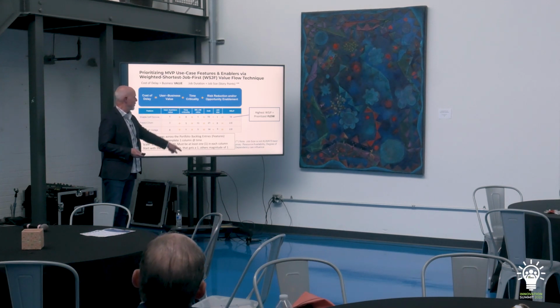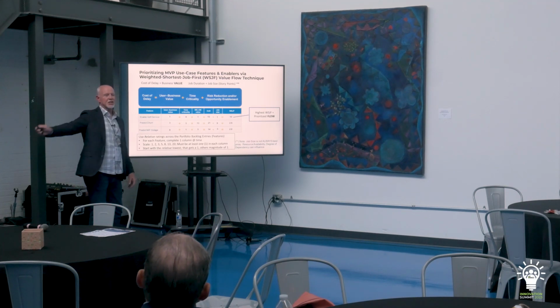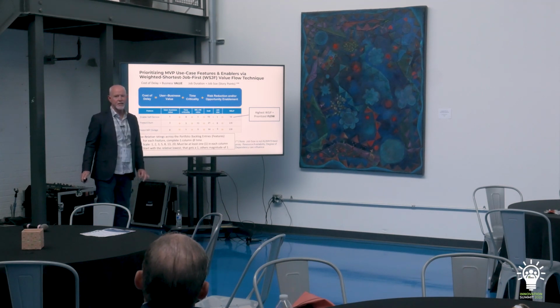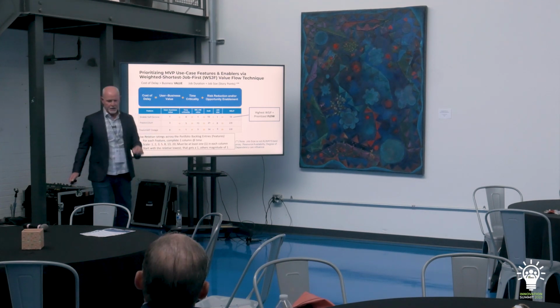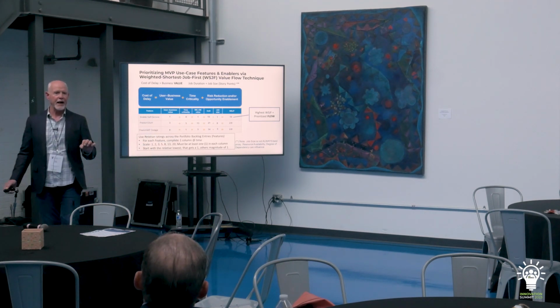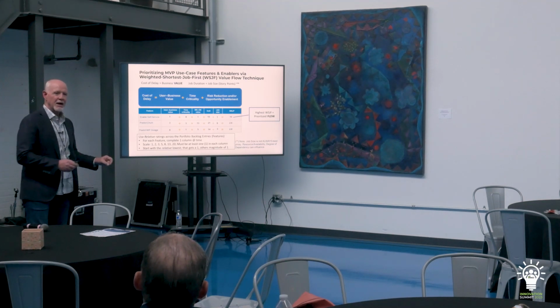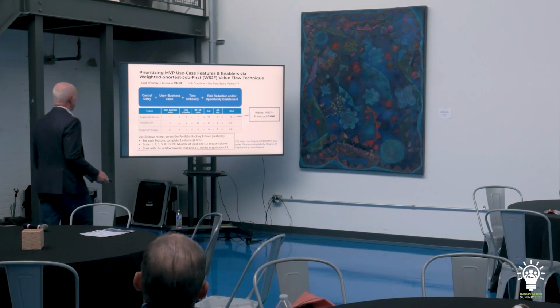And then you do the same for time to market, time criticality. Which one has the least time sensitivity to it? That would get a 1. Which one's most time sensitive? That would get an 8. And then you would do the same for, is it a risk reduction or an opportunity enablement, which is slightly different than business value, right? I have to do it to reduce risk. Doesn't give me any value, but it protects, it's an insurance kind of thing for the company.